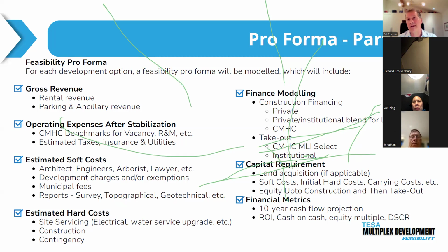So at the very beginning, we take people, package the whole deal, and take it to CMHC. They then in turn will review the deal, and if everything is to their satisfaction, they will issue a COI, which is a certificate of insurance. Again, CMHC is not a lender, but they're a quasi-government arm that insures mortgages. And so once you have the COI, you basically have your project figured out.